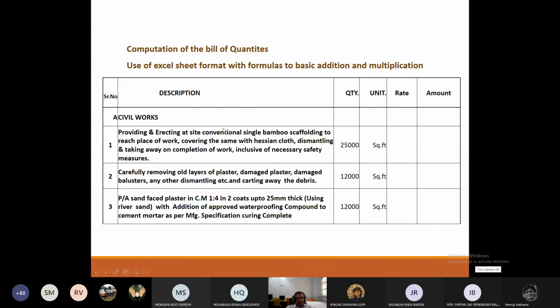Barricading of 1.5-meter height, no, that's not good enough. 1.5 is too low. 3-meter height? 3 meters is 10 feet. Maybe 12 feet. Just to be clear, between 2 and 3 meters is good. Yeah, 2 meter or 3. 2.5 meter high. You have what are called MS powder coated sheets, those things.